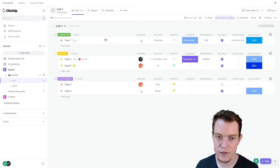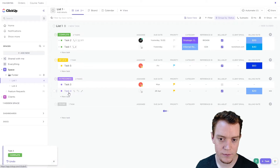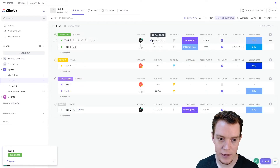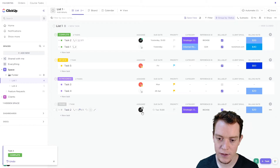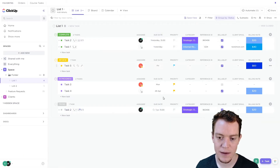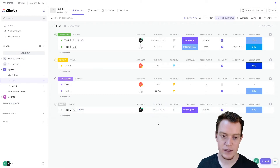Now if I close this task — task two — we'll see that it recurs. The closed task two is now here, and the new task two has been created with the due date as next week. So this one was the 20th of April, now it's the 27th of April. So that's the basics.